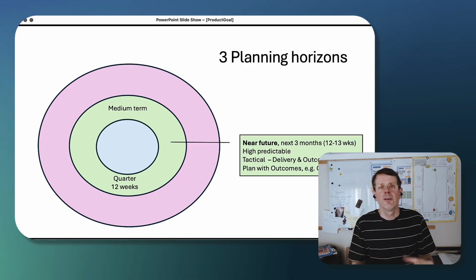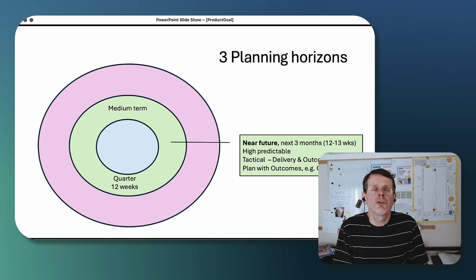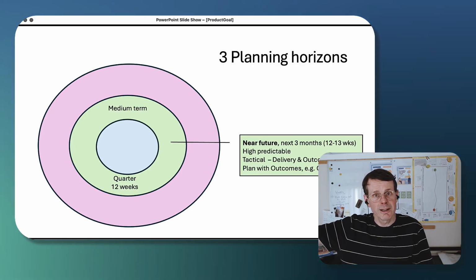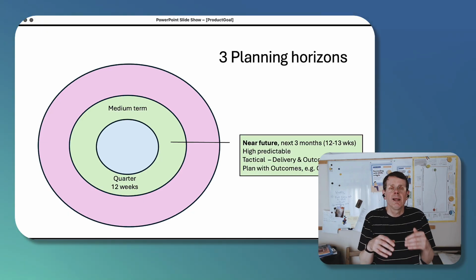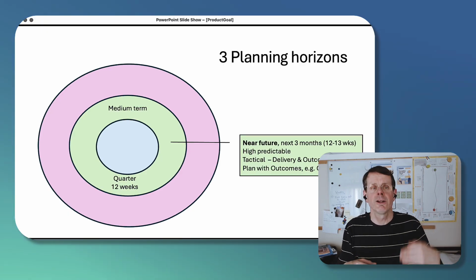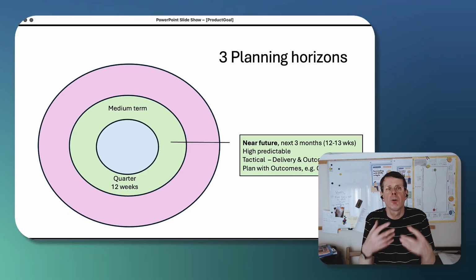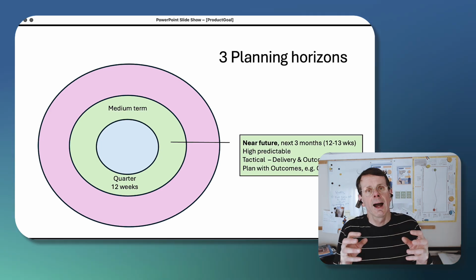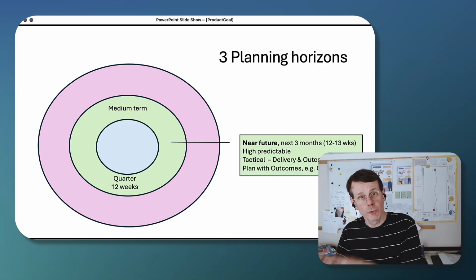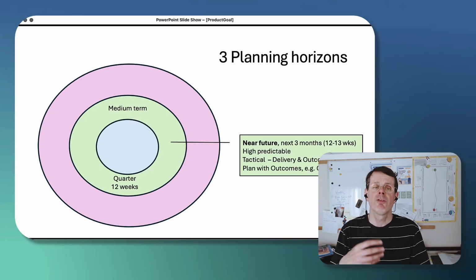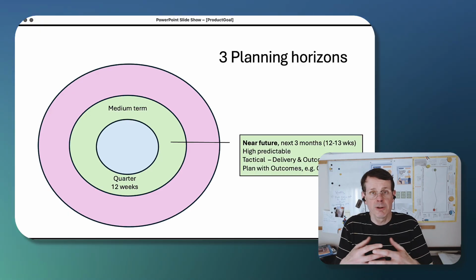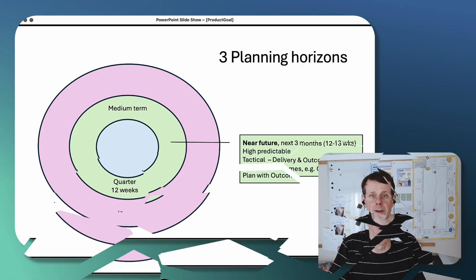key results. The aim of quarterly planning is not to decide what tasks will be done. That gets done in the sprint planning, the immediate planning. At this level, it is to decide what the outcome will be for the end of the 3 months. What can we achieve? The team will be responsible for delivering these outcomes. At this level, the question is less how long will it take to do this and more how much of this can we do in the time available. You've got 3 months. Maybe you can't solve everything, but you can do something.